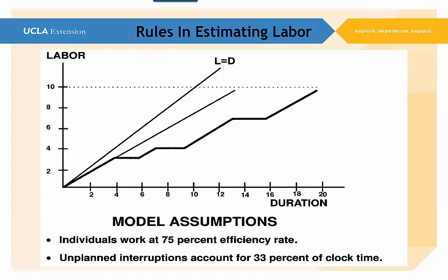Even while that's all interesting, what's important to you and to me is that when I have a 40-hour task and I need to schedule that, can I schedule that in a 40-hour week? Or do I have to schedule that in 6 working days, which is actually going to give me a 56-hour week? Or maybe schedule it over a course of 8 days, which is 64 hours. Good information here. I want you to really stay on top of that, understand it, and if you have any questions about it, let me know.